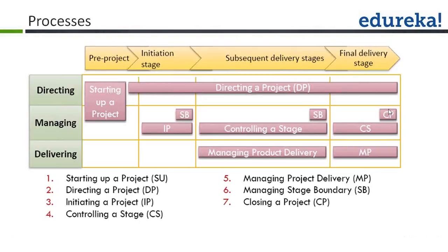And on top of all these processes, there is a process that sets overall direction of the project called directing a project. The owner of this process is project board. Now let's quickly go through each of these processes in details.